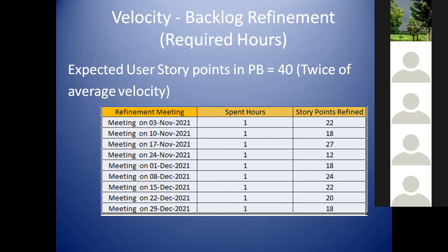If you look at this table, it is not giving standard story points, right? Some days it was more than 20, some days it was just 12. So why is there a fluctuation? Because what topic we are discussing also matters, right? Refinement is all about clarifying the details, understanding what is required to estimate the story, capturing any dependencies or risks, and identifying the action owners for that, so that it will be a complete refinement. Now in this case, a few stories are like a cakewalk for the team. They have easily estimated and come up with the story points.